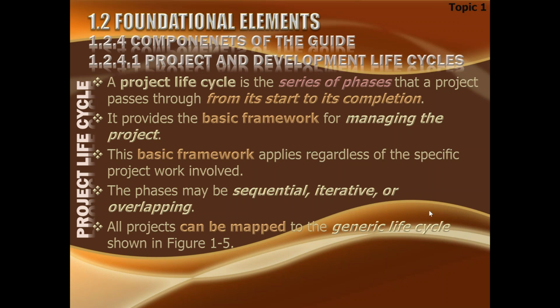Right. Well, actually, I did not agree with the WBS, but I did not object to it because ultimately this will be depicted in the overall WBS. That's why I did not object to it. But WBS is not the answer. The answer is to have sub phases to the phases. You create every phase which needs further description. You create sub phases under it, and maybe phase 1 could be divided into 3 further sub phases: sub phase 1, sub phase 2, sub phase 3, and you name them. So whomsoever is made responsible for that phase 1.